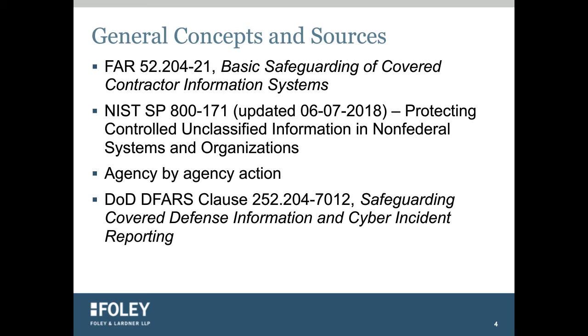And keep in mind that lack of compliance, obviously, can result in severe consequences. It can result in withholding of payments. It can result in a stop or suspension of work order. It can result in termination of the contract and even get a contractor placed on an ineligible list. So it's not something to take lightly.